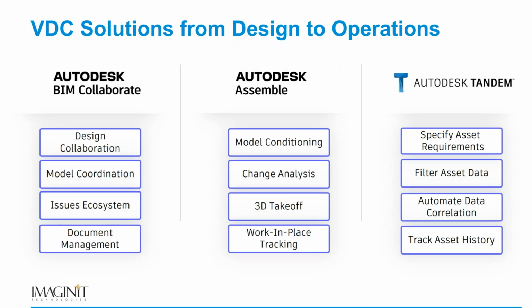And it can also break the model down into components that can then be fed into a tool like Primavera or Microsoft Project to help better schedule the actual physical things in the model that can be then moved into a true scheduling tool, but it can do those initial scheduling aspects of the physical aspects of the building, the foundations and the steel and the exterior walls and the curtain walls and so on there.